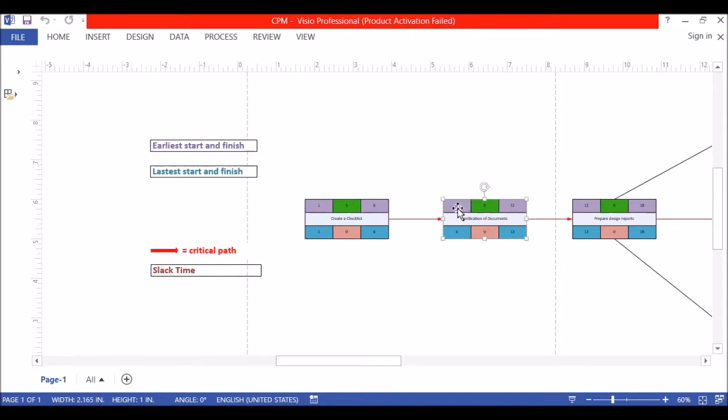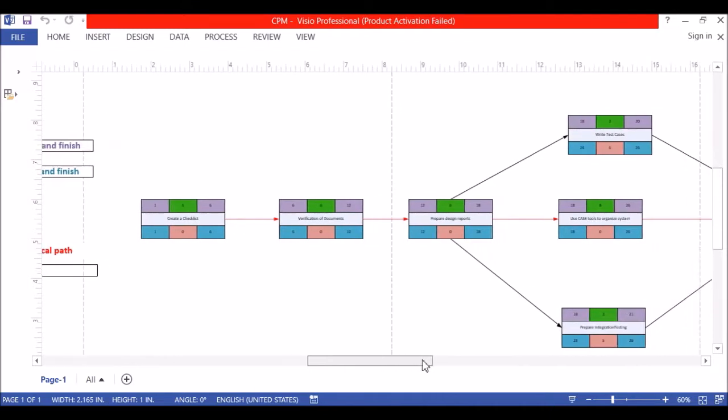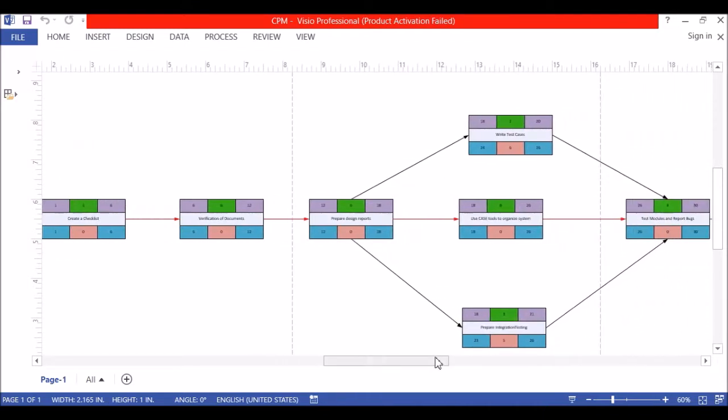You add this earliest start date to the duration, and 6 and 6 is 12, and you continue doing this for all the rest. However, if you have a break off here, 12 and 6 is 18, you would still carry the 18 across to all 3 boxes.